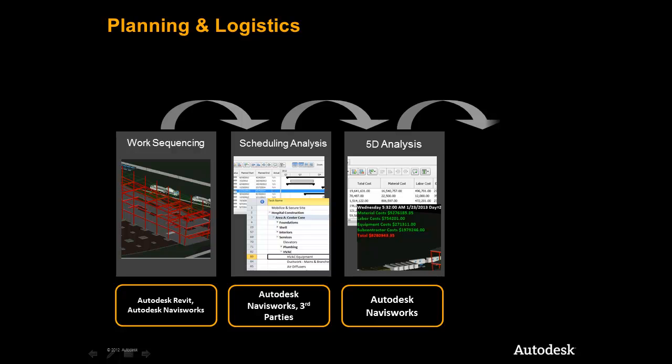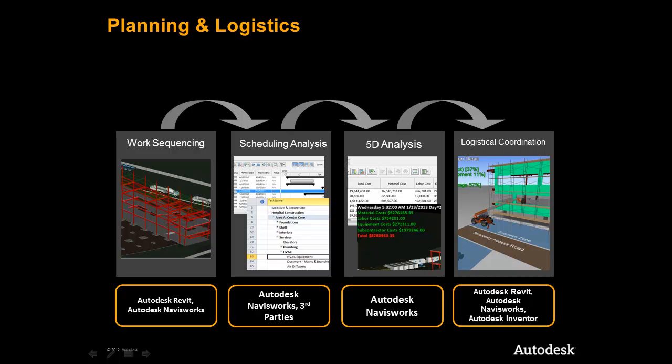We will complete the workflow by zooming into a particular part of the project and show how the Autodesk Construction Solution is leveraged to create logistical sequences. It is here that we can mock up a complex set of tasks and ensure that the planned activities will work both spatially and within the time constraints of the project.